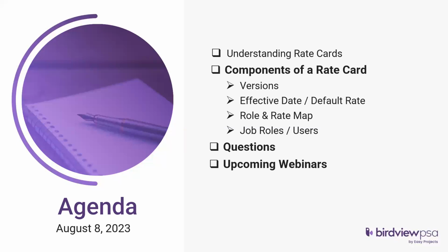It also helps you track different rates that are applied to a specific project, and it's mostly utilized if there are projects that run over a period of 12 months or more. So why are rate cards beneficial? First of all, one of the benefits is that they are role specific and not necessarily user specific. Even though you can add specific users to a rate card, it is really beneficial when the rates are applied at a role level, because it allows you to manage the billing rate at a higher level.